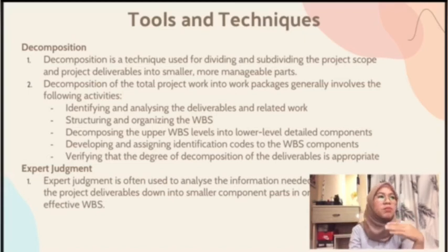The WBS may be structured as an outline, an organizational chart, or other method that identifies a hierarchical breakdown. Verifying the correctness of the decomposition requires determining that the lower level WBS components are those that are necessary and sufficient for completion of the corresponding higher level deliverables.